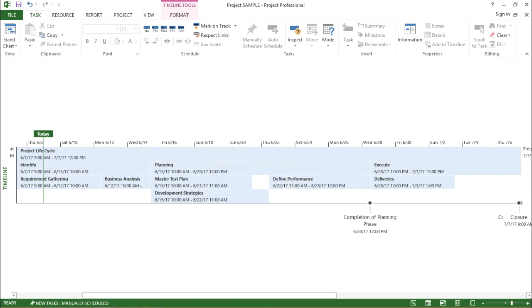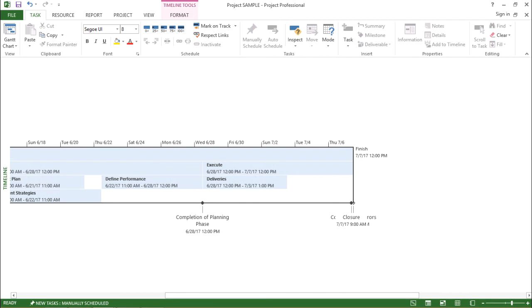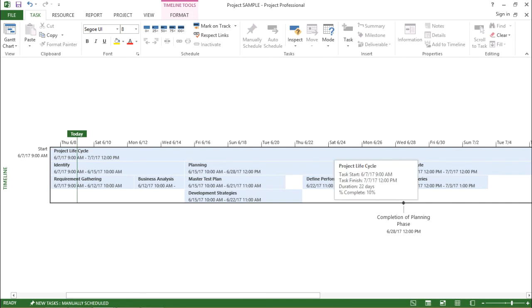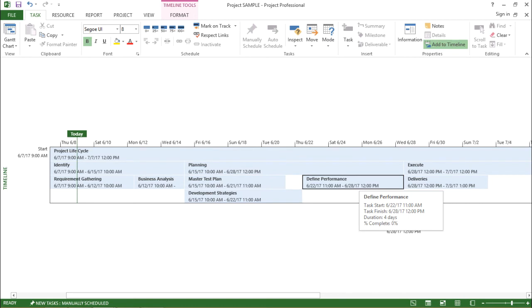It shows me a detailed timeline view in which I can see today's date, the start date of my project — if I scroll to the left it has the start date of when the project will begin — and if I go to the extreme right it shows me the finish date and time. I can also see the milestones achieved in this timeline, which are represented by a small black diamond. This view gives me an option to see how the schedule is progressing on a proper timeline and how much of each task has been completed.